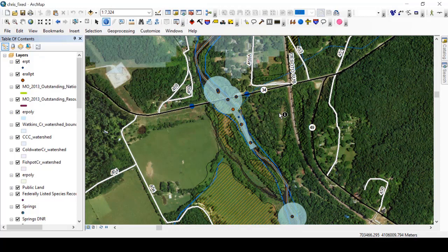So those are essentially the fundamentals of identifying what you might have in the area. So what we have here is a sensitive stream that has wetlands in the area. There's also other things that we need to look out for, and these are called regional conditions. So these are things that would put spawning restrictions on this stream, so work couldn't occur at this location during a certain time.